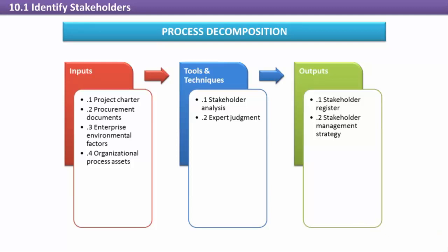The best place for initially finding stakeholders is through the project charter, contracts, request for proposals, and statements of work. Stakeholders can also be found by looking at the organizational chart and informal reporting structure and relationships within the organization. Stakeholders can also come from outside the organization, including customers, suppliers, vendors, investors, industry groups, labor organizations.